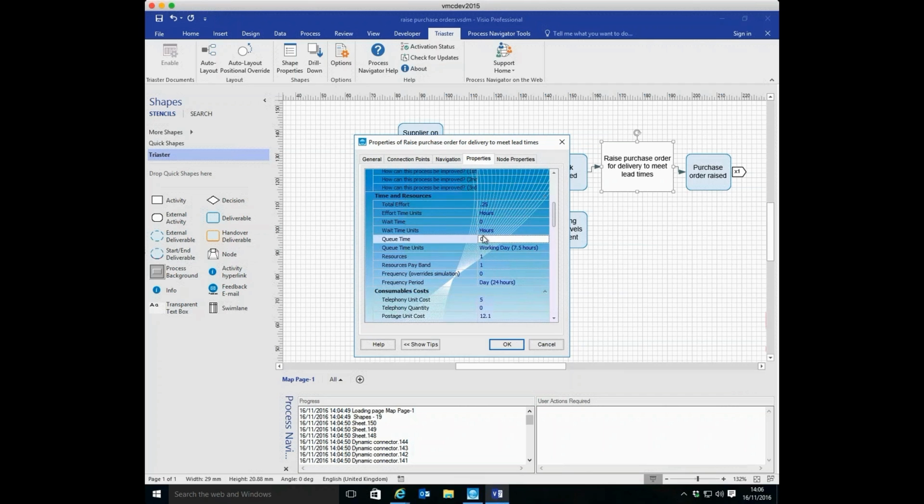And you can see each of these metrics here we can build up. If we want additional time measurements in there, we can put them in. If we don't want it as complex as this, we can take them out. Resources are in here. The resources gives us the total number of people working on the job. So if the job is 0.25 and there is one resource, then we assume the calendar time of doing this is 0.25. But if there were two resources, it would halve this in terms of calendar time.